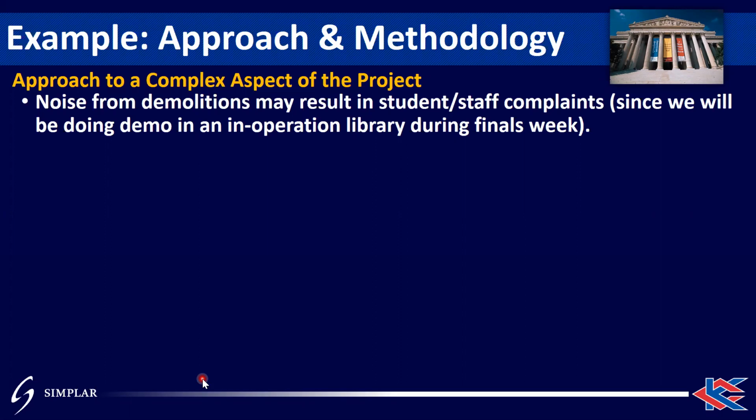They were renovating a museum and library, and the way the schedule lined up, the proposers realized that the demolition phase was going to occur during finals week, and that's a big deal at Harvard. I guess it's important to study there. So doing demos during an operating library during finals week, that's kind of a concern.